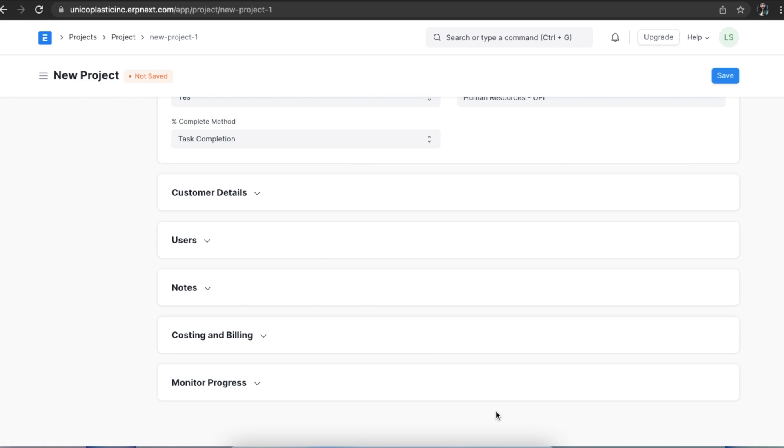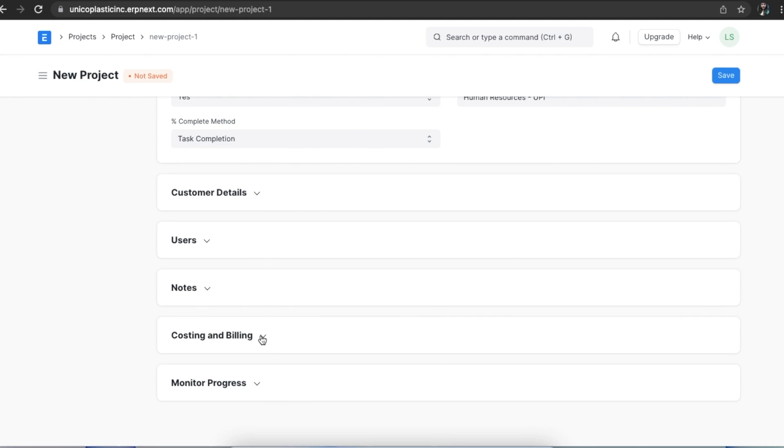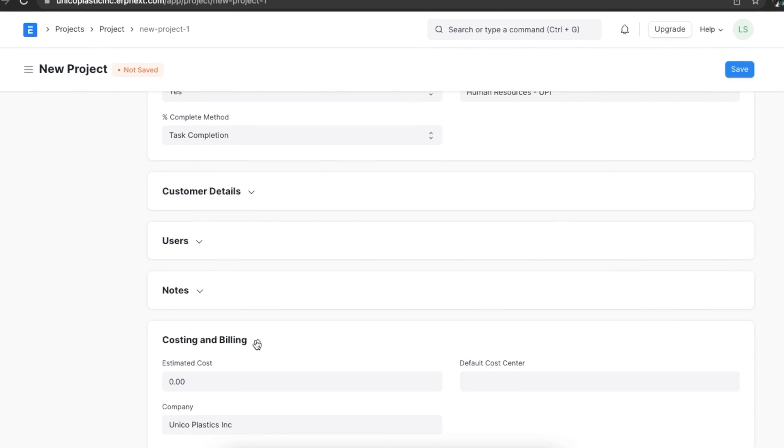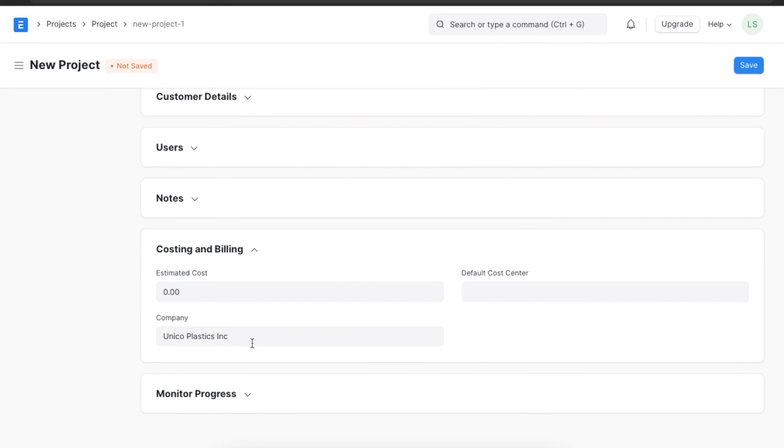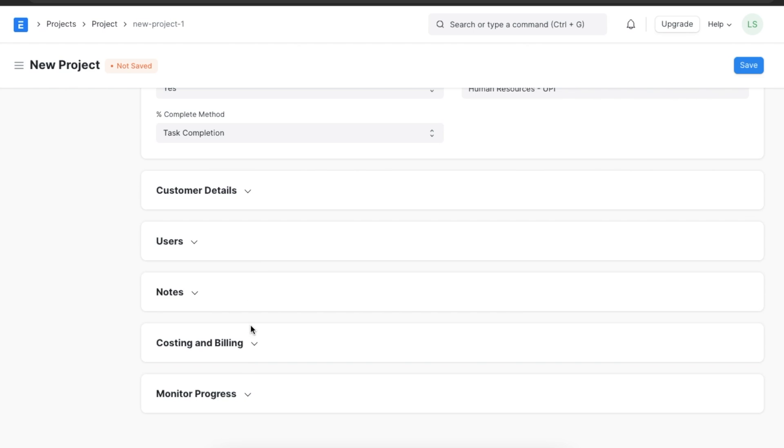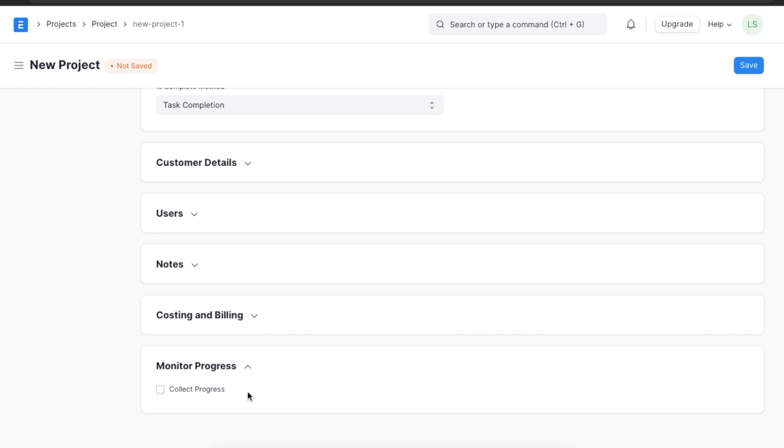In the costing and billing section, we can add an estimated cost for this project and select a cost center for the expenses made in this project.